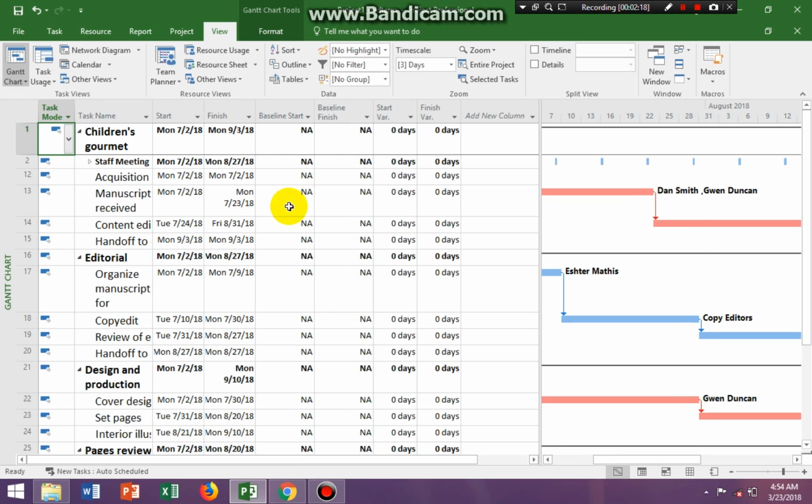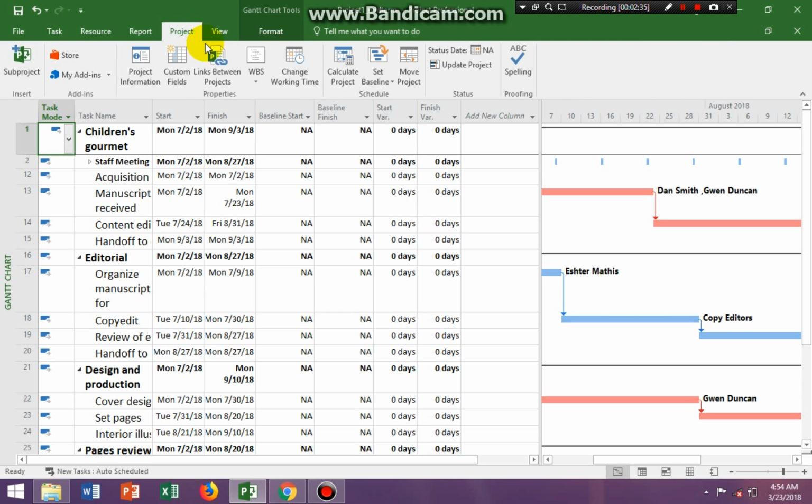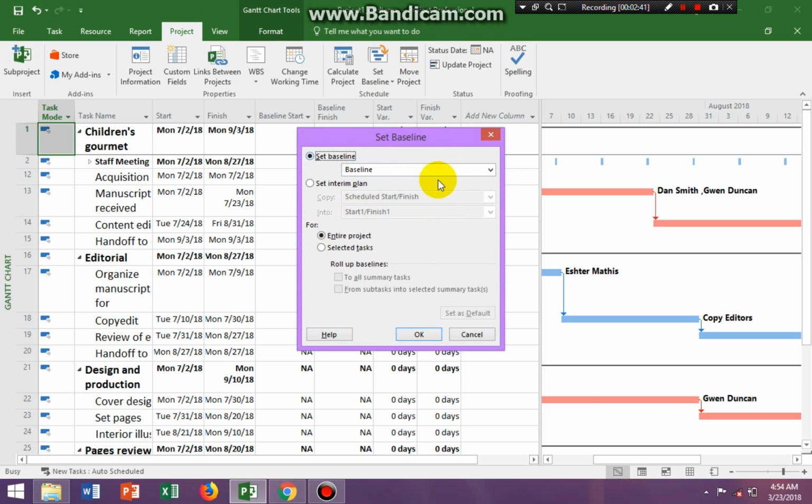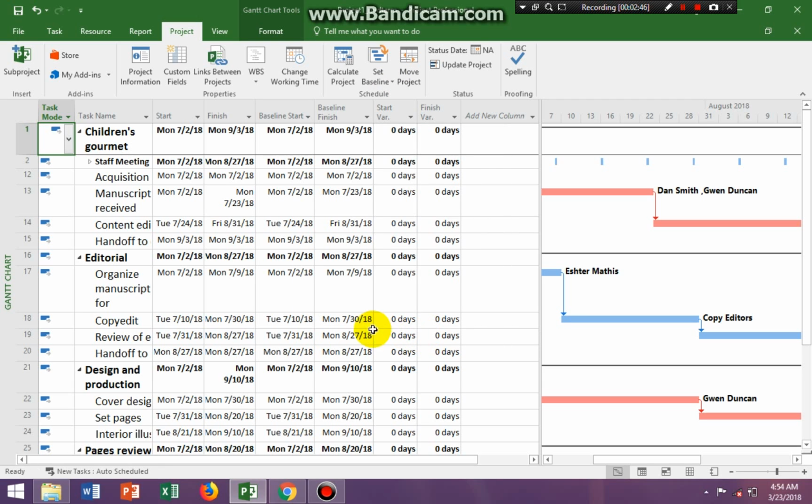Okay, we can see our baseline start time is 0 and our finish time is 0 because we haven't really started this project yet. But to set a baseline for this particular project, you need to go to project, and then in the schedule group you can go to set baseline, and we just want to set one baseline for the entire project, and we say okay.